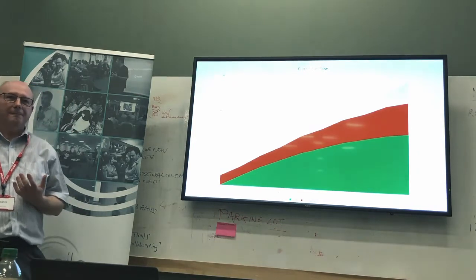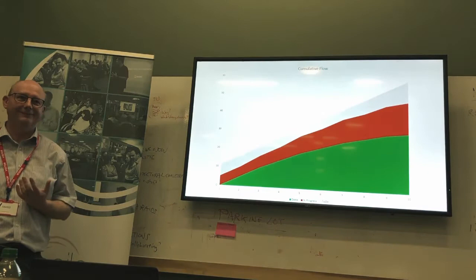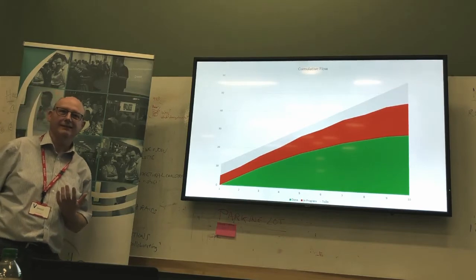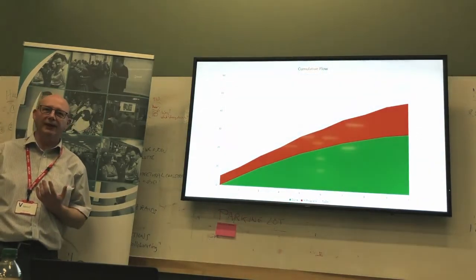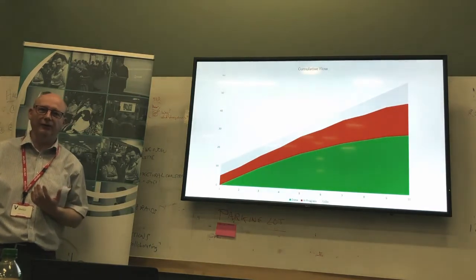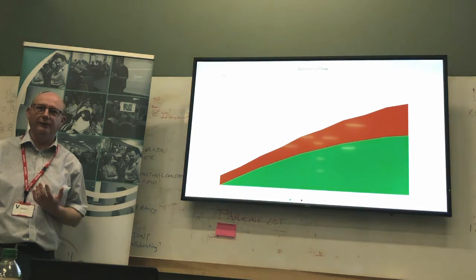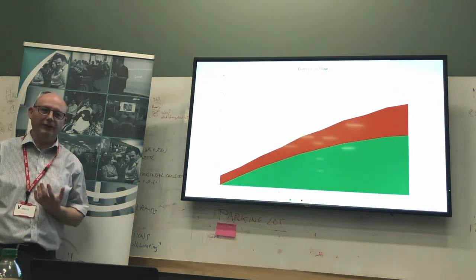So that is a push system in operation. Pushing work onto the team rather than them pulling it. That's where you're told what your velocity is. Your velocity is 30. Good luck. You know your velocity is 10. We've allocated this many man-days to the programme. We're going to finish it on the 19th of November. So this is how fast you need to start stuff. Yeah. We've seen that style of programme management.